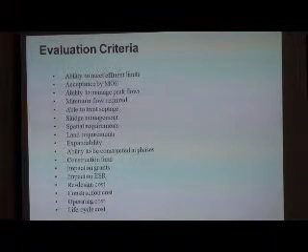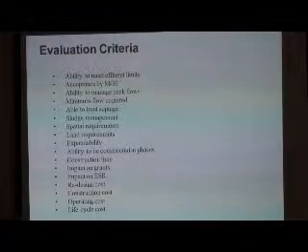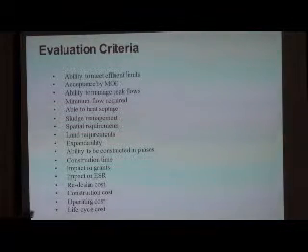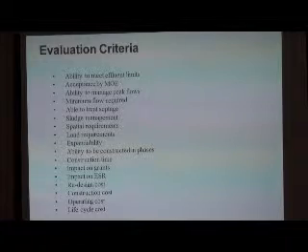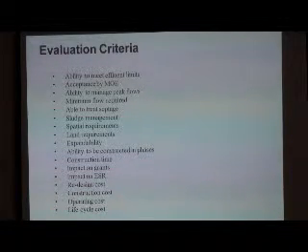We wanted to make sure that it was phased. It could be built in phases so that if Blue Water comes on, or if you see growth greater than what's projected for the 20-year, then you can add a module and phase the plant up. We also wanted to look at the impacts on the environmental study report, because that's fairly important, and also on the grants too. So we took a look at all those factors.